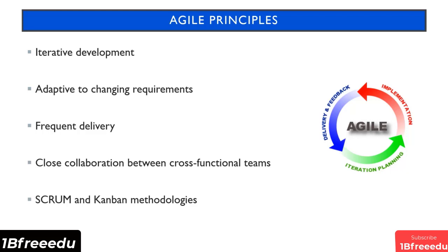Feedback is then gathered and used to plan the next iteration, and this process continues until the product is fully polished. This process allows the team to adapt to changing requirements, as the feedback loop starts at a very early stage. So if some requirements change, because the iterations are relatively short, these changes can be fed into the next iteration, thereby keeping the overall development flexible and adaptive.